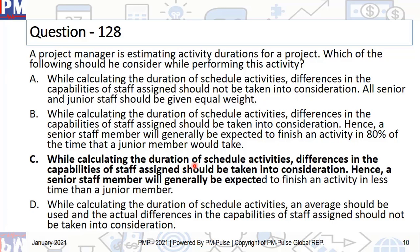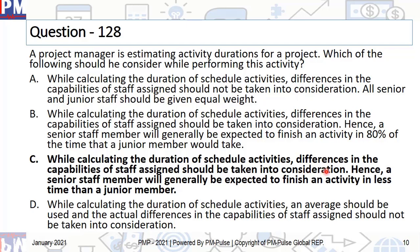While calculating the duration of schedule activities, differences in the capabilities of staff assigned should be taken into consideration. Hence, a senior staff member will generally be expected to finish an activity in less time than a junior member. I'm pretty sure you would have confused this with B. Between B and C, there's not much difference except that B gives a fixed percentage, which is not a good idea. Even within people who are good at their job — senior staff, experienced staff — they would not have a fixed percentage. Yes, they would definitely have better productivity, but we cannot put a fixed percentage to it.